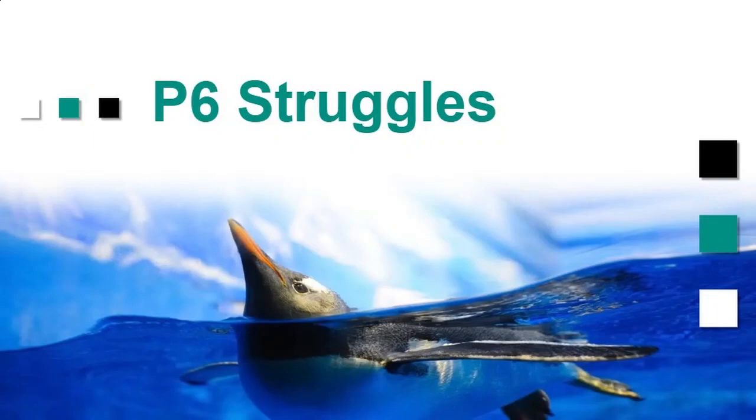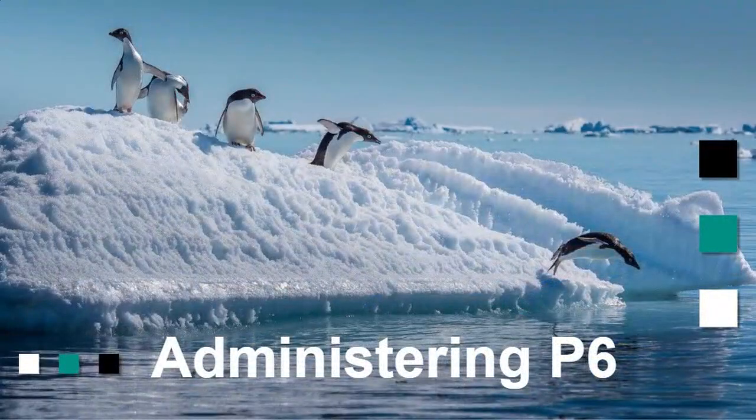The first one is administering P6 can be a real pain. And the reason for that is it's not easy to move things around within the administration modules of P6. In the latest releases, they've allowed you to at least use one profile to create another profile when you're adding users, but there's a lot more to P6 administration than just users. You need to manage your EPS and OBS hierarchies. You need to manage your security profiles. You need to be able to move things from one database to another.